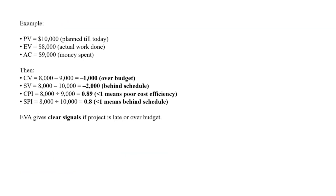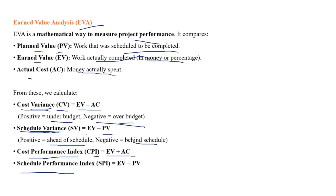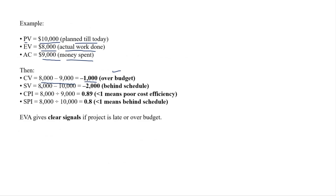Example: PV = $10,000 (planned till today), EV = $8,000 (work actually finished), AC = $9,000 (money spent). CV = EV minus AC = 8000 minus 9000 = minus 1000. Negative means over budget. SV = EV minus PV = 8000 minus 10000 = minus 2000. Negative means behind schedule — we had 10 tasks to complete but are falling behind.